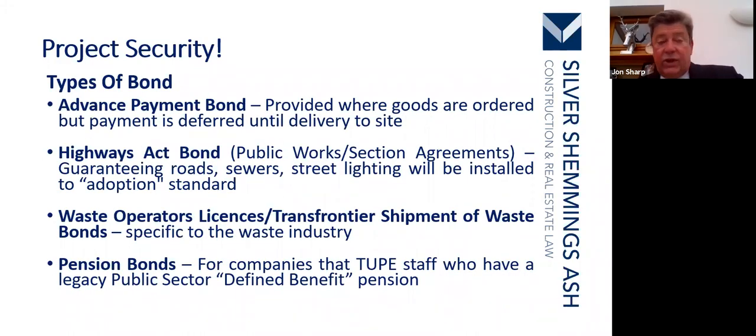There are also advanced payment bonds. These are provided where goods are ordered, but payment is deferred until delivery on site. Again, you have a situation where you've ordered the goods, you don't get paid until it's delivered to the site, but during transit, for example, all of the goods are destroyed. So an advanced payment bond assists there.